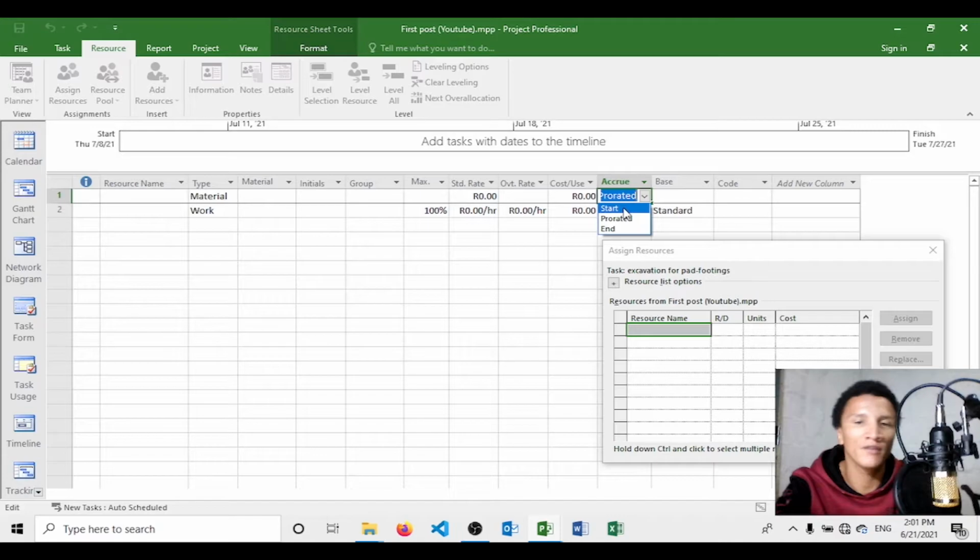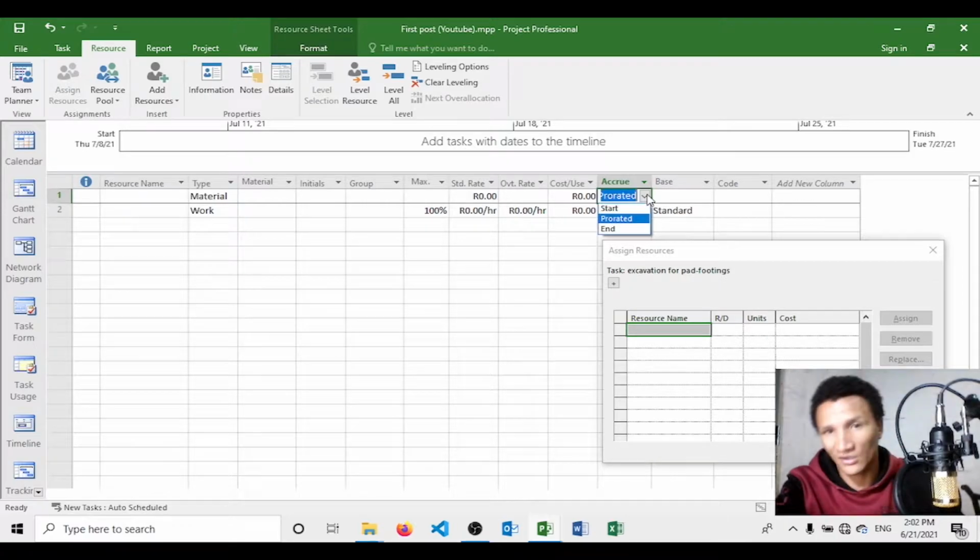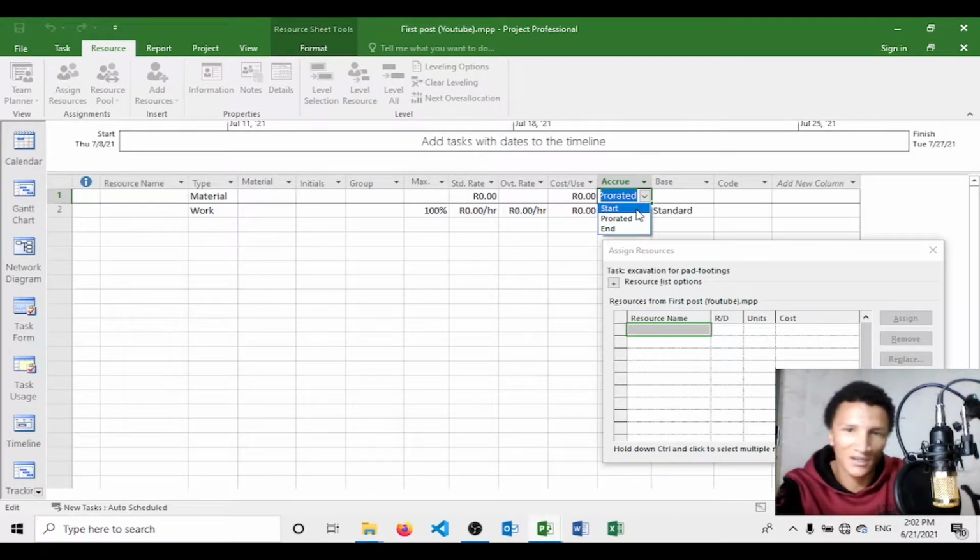For material, either you have an account at a certain hardware store, so basically you pay them at the end, but if you don't have an account, you have to go and pay them at the start. I don't know if you can pay them as the project goes on, and then you say, okay, I want to pay every end of the month, payment on my account. Now you have the tender, you don't have money to buy the material. Now you go to a supplier and you ask him, listen, we want material, but here's our tender, and we will pay you off at every end of the month whenever we invoice the client. So that can also be the case, but usually, let's say you don't have an account, you pay at the start, so whenever you go there, you pay.